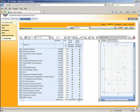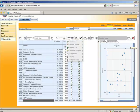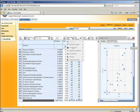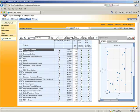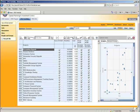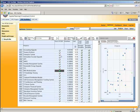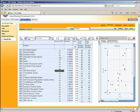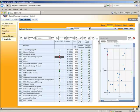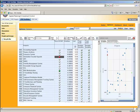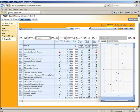So we need the ability to tweak this, though, right? This has been all mathematics and very objective. What we want to be able to do is use a functionality called Force In and Force Out under the Optimization menu. And here we've added the Force In and Force Out column. And what we're going to do is we're actually going to force in some projects. This one, for instance, at $5.4 million, hasn't been selected at all. You'll note, if we force it in with green, and then maybe this project up here that's been selected for all of them, we'll go ahead and force that one out. It's been selected every time. And then let's hit Next.